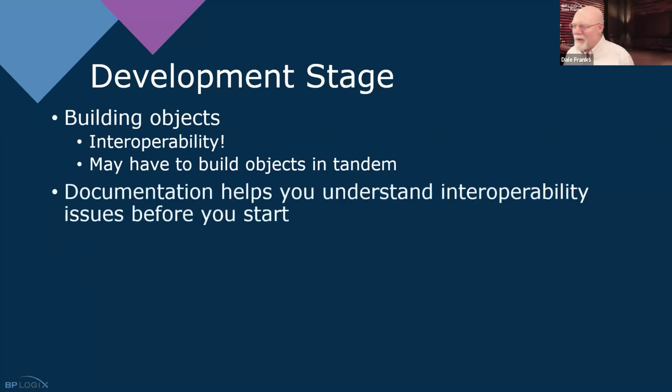Development is always a little tricky, which, by the way, is why we've made all these Excel spreadsheets, so that we know what we're doing beforehand and we can prioritize the work so that we can do it most efficiently. So when we look at the spreadsheet, if it says I'm going to need 3 drop-down objects, or I think in our case it was 2 drop-down objects, guess what you're going to have to build first to make your life easier as an application developer?